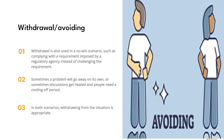Example 1: Small disagreements. In a project team, two team members have differing opinions on a minor aspect of the project, such as the color scheme of a website. Both feel strongly about their preferences, but overall project progress is not significantly impacted by this choice. In a withdrawal, avoiding approach, the project manager might choose to let the team members resolve the disagreement themselves or give it time to naturally resolve, acknowledging the issue isn't worth escalating. By not investing significant effort into a relatively minor issue, the project manager maintains focus on more critical project matters.